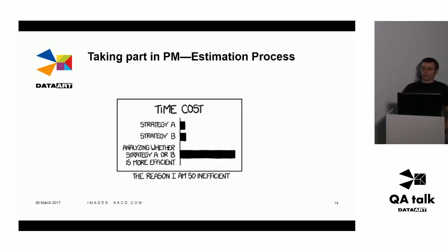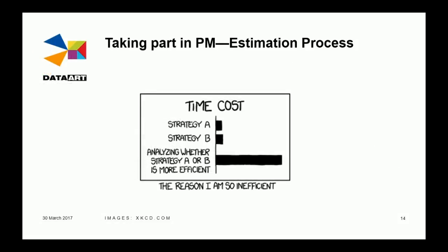Try to get involved in estimation processes. This includes not only sprint estimations, when you attend meetings where developers estimate stories, but also project milestones and project deadlines. You probably are not going to be the person who gives an estimate, but again, ask questions, highlight dependencies, highlight hidden complexities. People who provide estimates will listen to you, and probably their estimates will be adjusted.